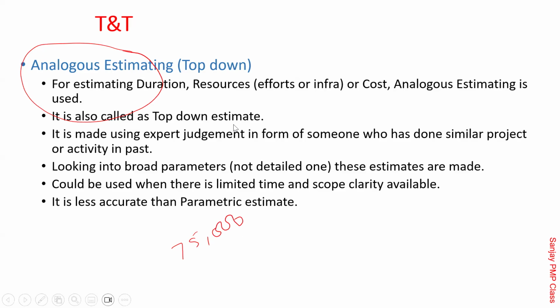Is it possible to make such an estimate? It happens, sir, it happens. This is called an analogous estimate. An analogous estimate is also called a top-down estimate. It is a top-down thing where no breakup is done. The overall scope is seen, and based on past experience he is able to do that. Remember, don't even think that this is only a story. In real life, analogous estimates are very commonly used all over the industry. Is it correct?